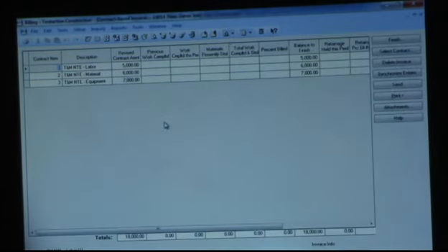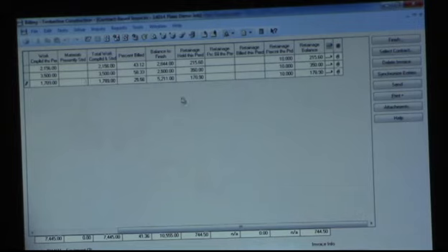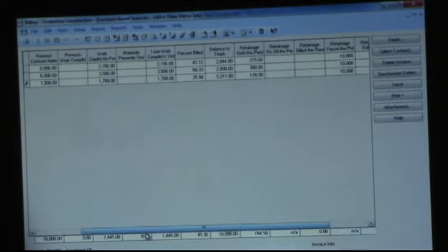And so we sent this up with three line items. Then you can come in every month and say, this month I've done this much labor, this much material, this much equipment. And it will say what percent complete you are, how much retention is going to get held, and what the total retention held so far is. If you want to say, hey, I'm 50% complete, you can type in 50% and it will do the math for you.